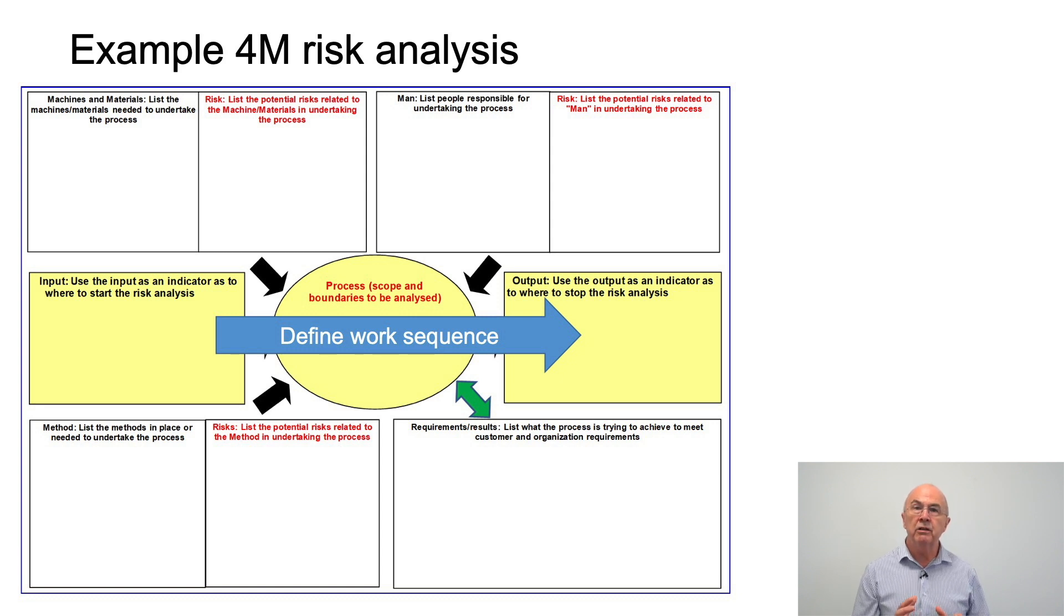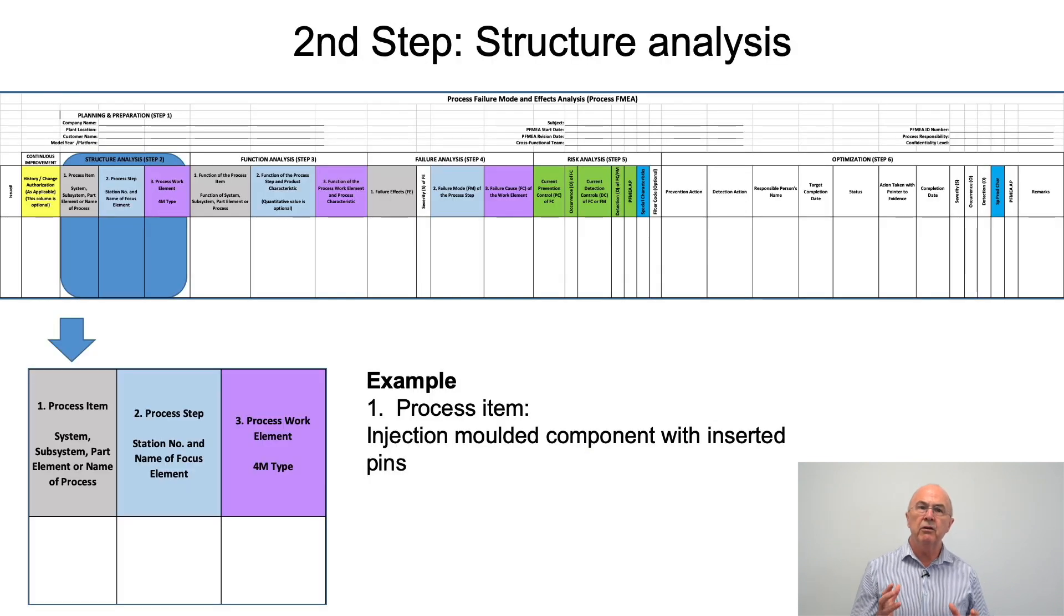Coming down to the bottom left hand box we can think about the documentation and the methods that we're going to need at this process step and the associated risks. My recommendation is this is not done in a computer but we take this 4M format down to the shop floor to a similar manufacturing process and we collect this information, get an operator input and maybe also get an input from the supervisors.